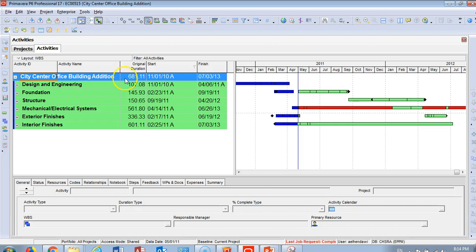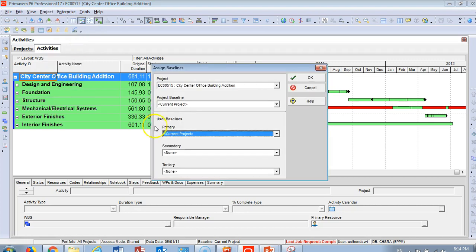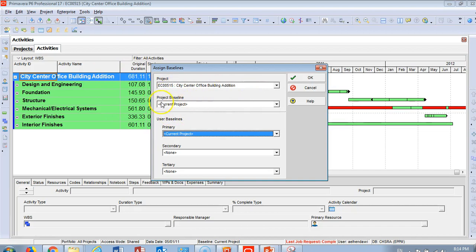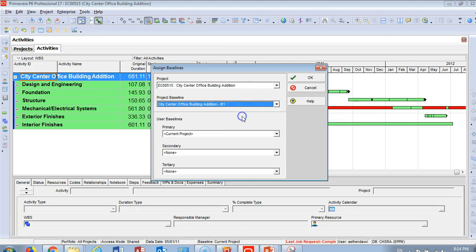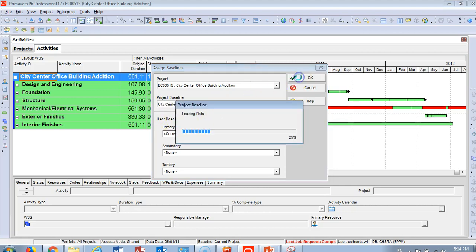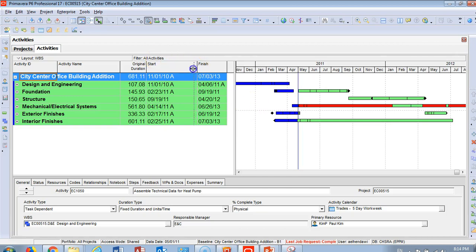So now, do we have a baseline? No, we don't have any baseline yet. What's the next step? Bear with me. Go to Assign Baseline. When you assign a baseline, you'll find your project name and project baseline. Open this arrow, you'll find your baseline, and click OK. Now we've maintained the baseline and assigned the baseline.